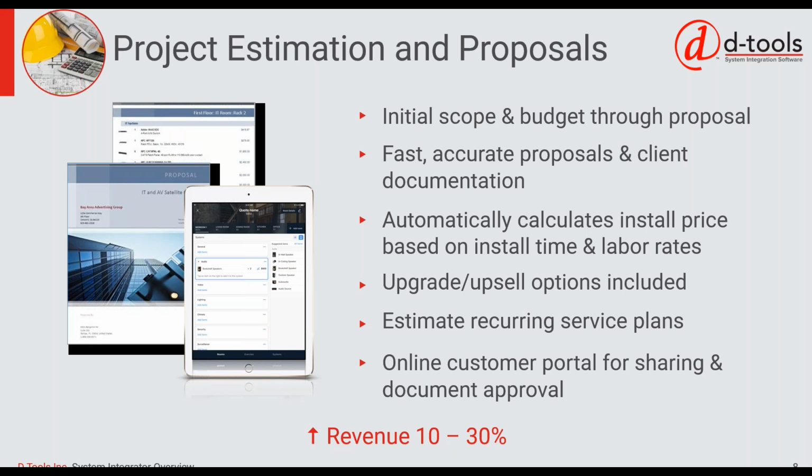It also eliminates the potential mistake of forgetting labor. I think everybody is guilty of that, forgetting to account for certain labor things. So this will help build it in there, and also account for other things that oftentimes don't get calculated at all or get miscalculated, which is things like designer engineering time, programming time, management time or project management time. That can all be baked into your rates if you want.